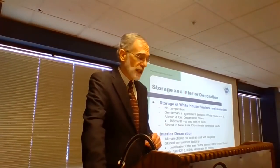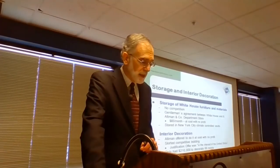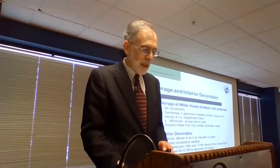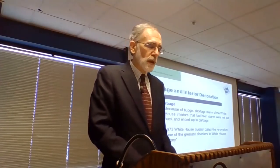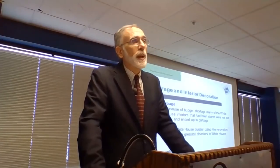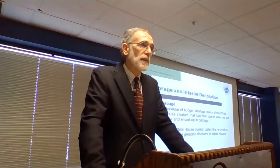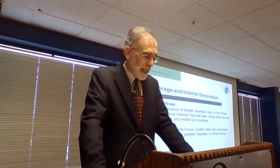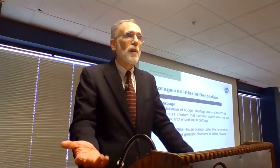$212,000 to decorate 66 rooms, and they had already spent $232,000 on temporary construction shacks. So because of budget shortfalls on the project, much of the material that came out of the White House and that was stored did not go back into the White House. It was simply too expensive to do it, and so a lot of it ended up in garbage dumps. The curator of the White House in 1973, talking about the renovation of the White House in the 1950s, said it was one of the greatest disasters in White House history. Their surplus program was also mismanaged.